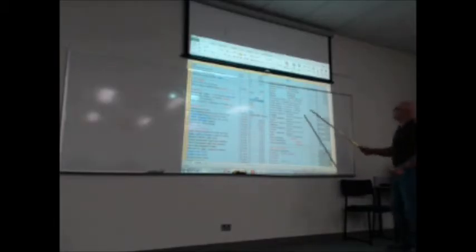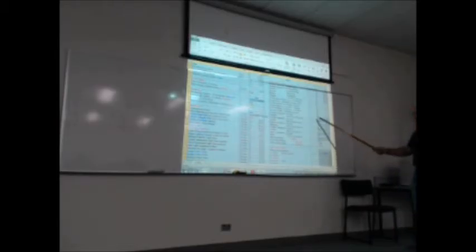So, with the prices in there, just trying to work out whether it's a linear meter, square meter, because the information is not clear. Where did I see it? Linear meter? Laundry cupboard, laminate, $250. So these are all linear meter at tops. Cupboard, laminate, $250 a meter. Then it'll be 520 a linear meter. So you just scale off your cupboard and apply whatever information you've got.